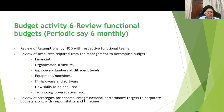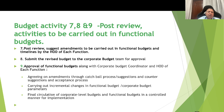Activity six is the review of the functional budgets, usually done at the six-month level. The HOD of each function — such as architecture, interior, or MVP — will review with their respective team the following parameters: review of assumptions; review of resources required from top management to accomplish budget targets, including financial resources, organization structure, manpower numbers, equipment, machines, IT hardware and software, new skills to be acquired, and technology application. The HOD will also review strategies for accomplishing the functional performance targets and aligning with corporate budgets, along with responsibilities and timelines.